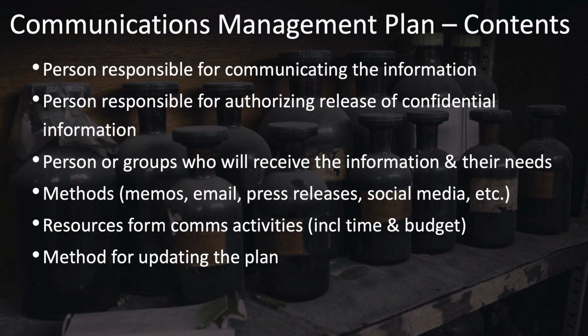Your communications plan should identify those resources that you will need to perform these communications activities. This is especially important that you identify the time and money that it will require to adequately communicate on this project. Also, if this plan needs to be updated, what are the processes and procedures for updating it?